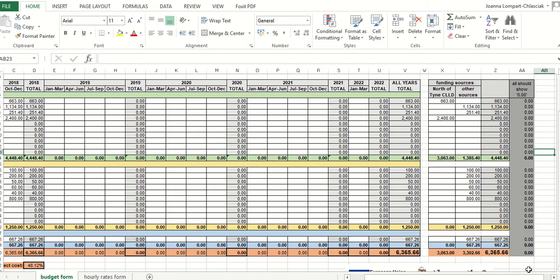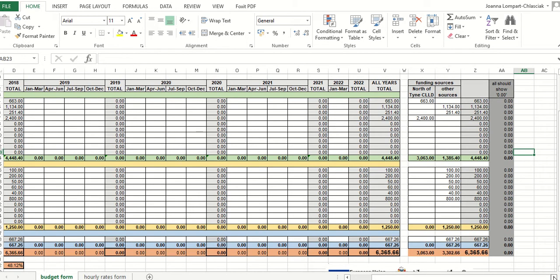However, if you don't have very specific requirements about your match funding, you may want to present all your budget headings as split 50-50, for example, for an ESF project, which is fine as well.